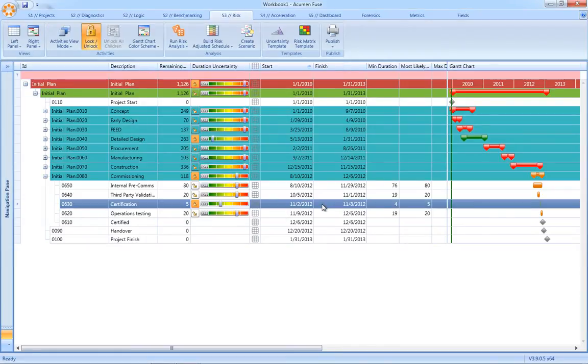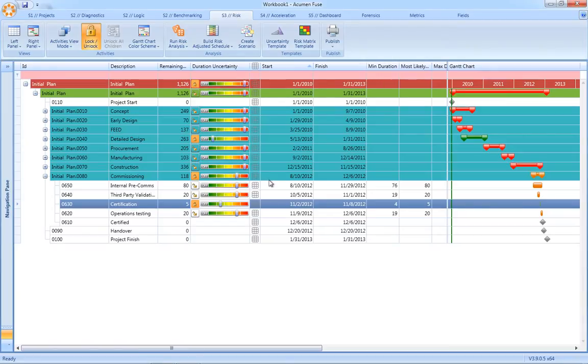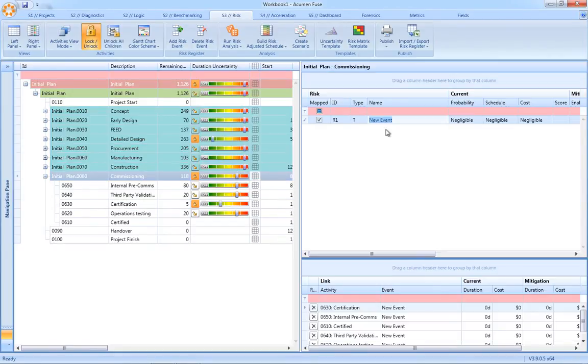Once the uncertainties have been applied to the schedule, the next step is to define risk events in the risk register. Again, very easy in Acumen Risk. You simply select the risk matrix and define your risk event directly in the risk register.